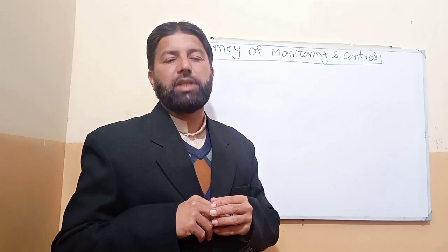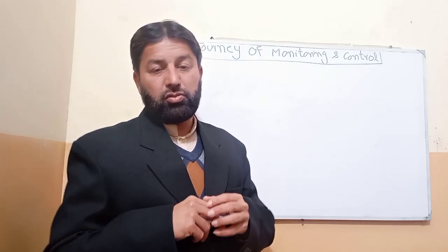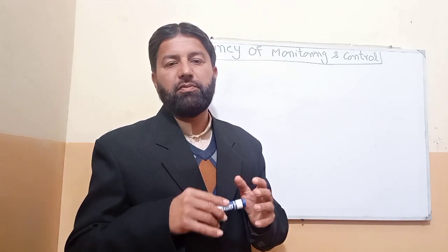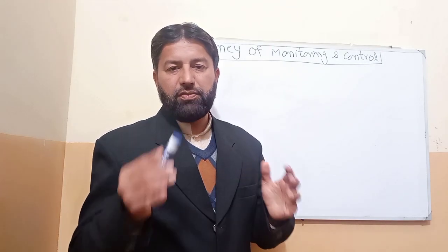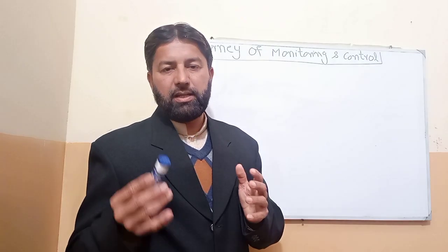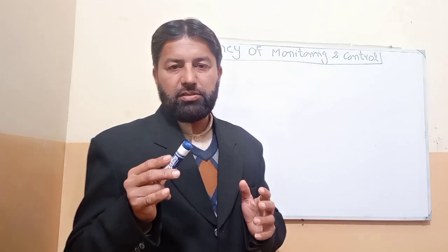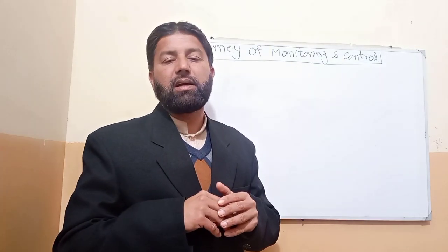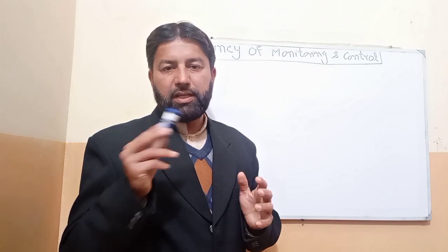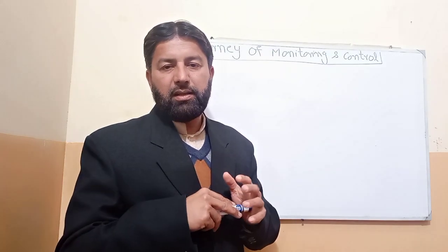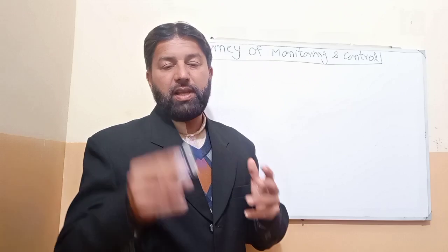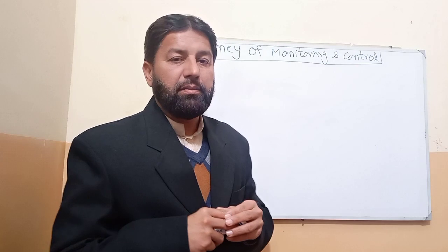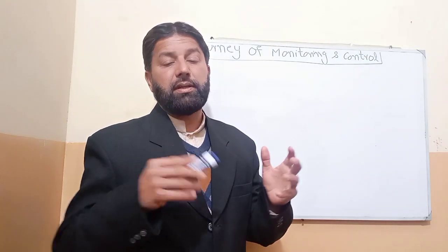And we will also check the deliverable. We will also inspect the deliverable. In quality control, the quality team will inspect the deliverable. If the deliverable is okay, we will get a verified deliverable, and this verified deliverable will go to validate scope. Here the client has to inspect the deliverable, and later we will get a validated deliverable and it will go to closing.